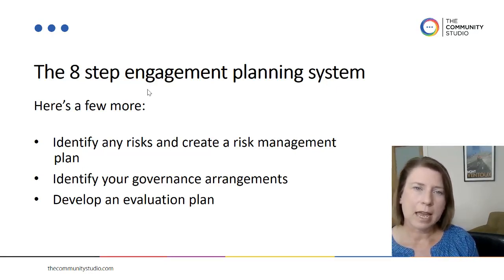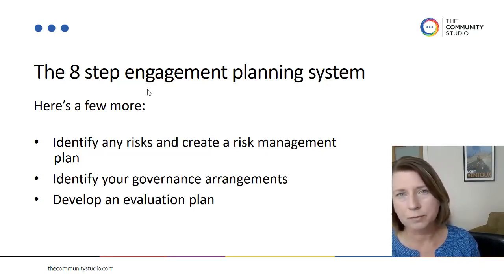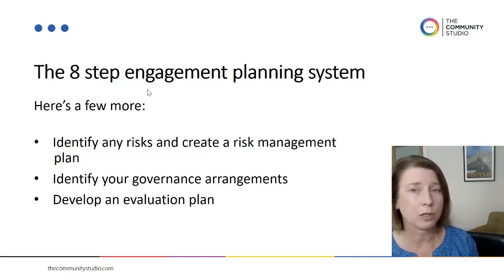I guess one of the key risks you find in engagement planning is if you're dealing with any frustration, particularly any historical frustration that you need to move past before you can get going, or if you're dealing with any difficult people or difficult situations, and having a plan to deal with that is important before you start.